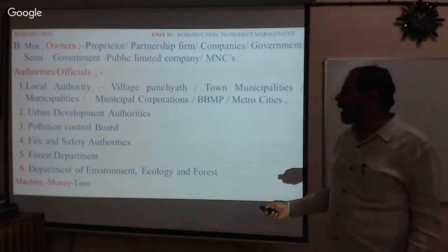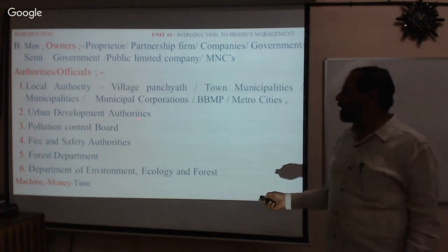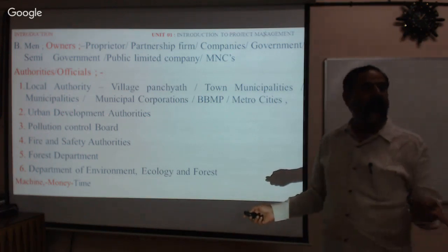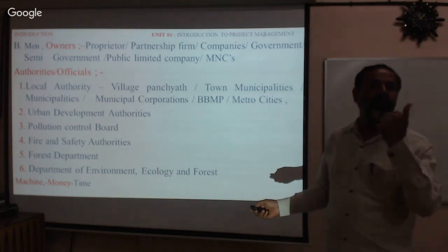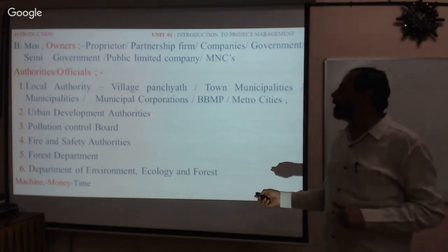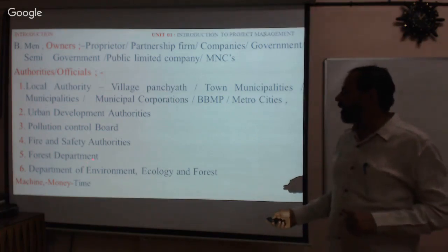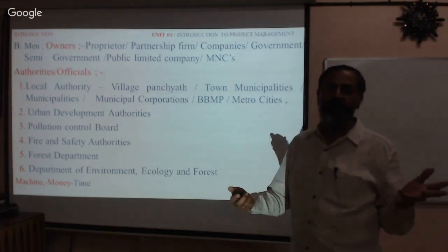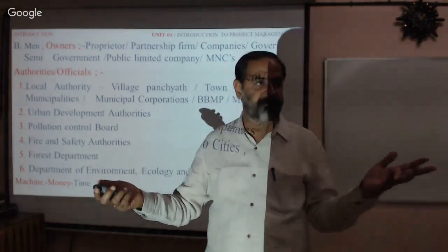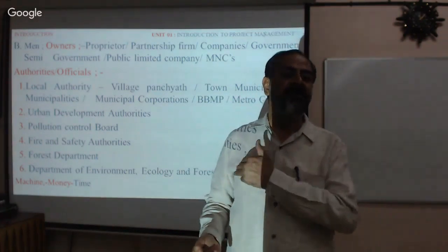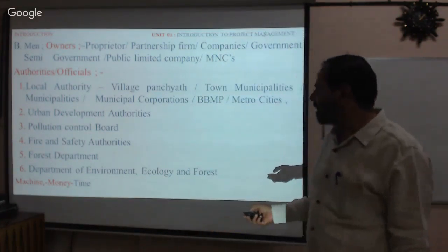If you buy a land, if you buy a site, you need to go and take the permission, the layout approval from the Urban Development Authority, isn't it? Like the Forest Department, if your site consists of a number of trees, then you need to take the permission from them. It is essential, isn't it?